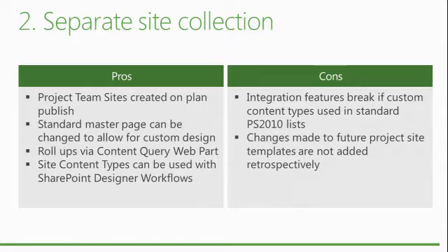Now you can start to keep things standard, and you can also start to control that by making those content types read-only so that you have a single form, so that you can then add a column that everyone is aware of and everyone's communicated, and you can handle the business side of these changes. And if you start using those site content types, you can then use the standard features of SharePoint to do